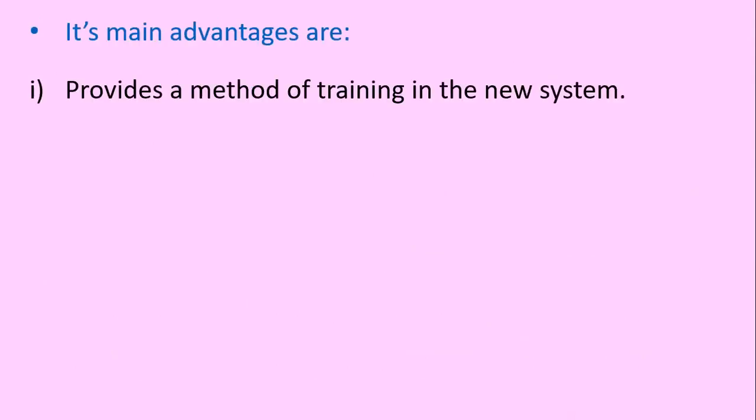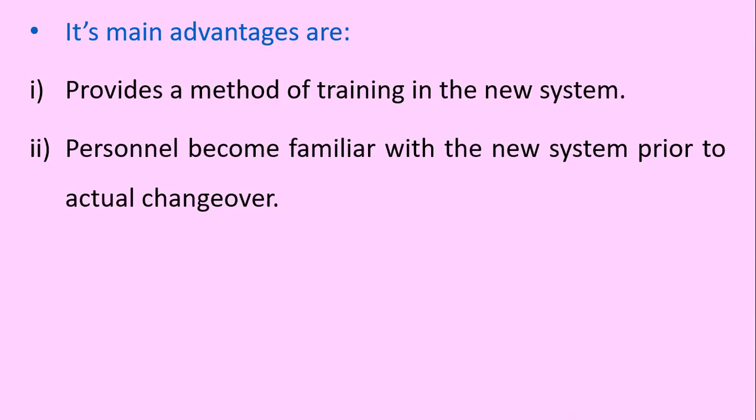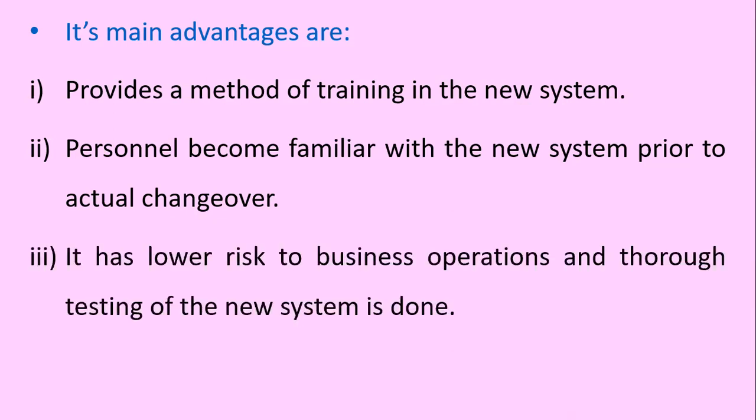Its main advantages are: number one, it provides a method of training in the new system. Number two, the personnel become familiar with the new system before the actual changeover. Number three, it has lower risk to business operations and the thorough testing of the new system is done.